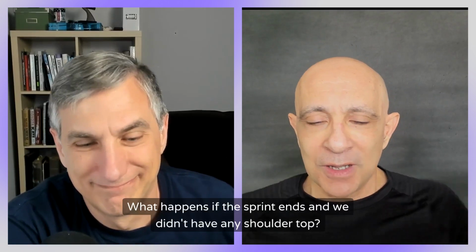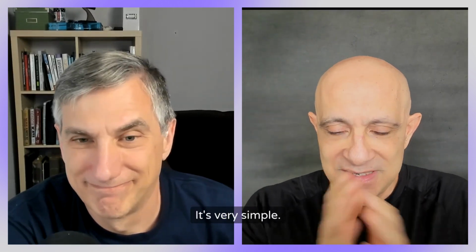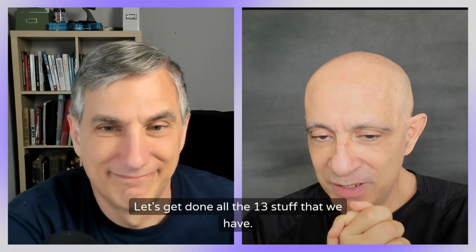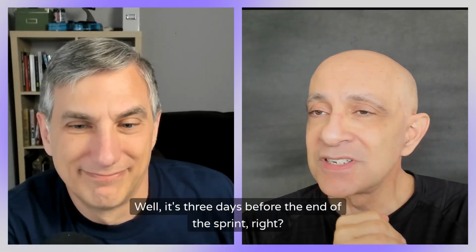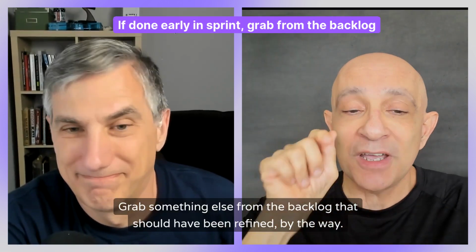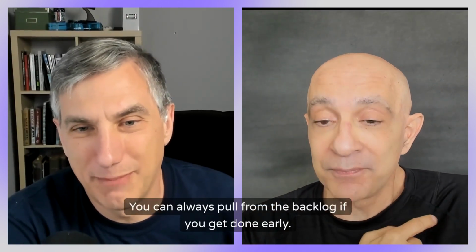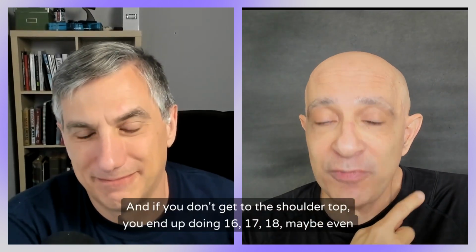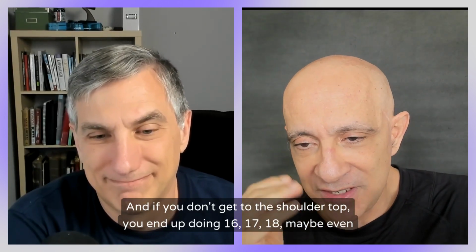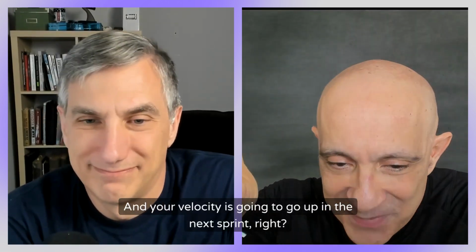But wait a minute. What happens if the sprint ends and we didn't have any shoulder tap? Well, it's very simple. You just go there and say, you know what? Let's get done all the 13 things that we have. Okay. Are we done? Yeah. Well, it's 3 days before the end of the sprint, right? Grab something else from the backlog that should have been refined, by the way. Yep, exactly. Always pull from the backlog if you get done early. And if you don't get the shoulder tap, you end up doing 16, 17, 18, maybe even 20. It depends. And your velocity is going to go up the next sprint.